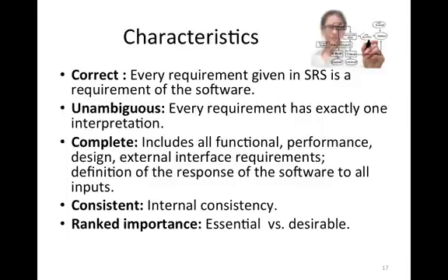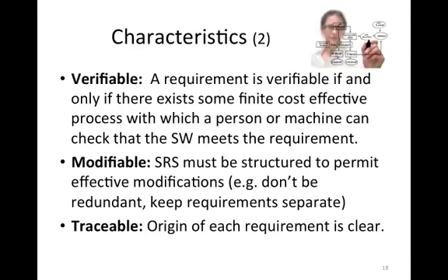And then, of course, we want to rank the requirements in terms of what's essential, what must be done for the day 1 release, and what is desirable. We do that because often time is at a premium. If someone has to decide what features to cut because we don't have enough time to finish, it's really great if that is done beforehand and people can prioritize the important tasks.